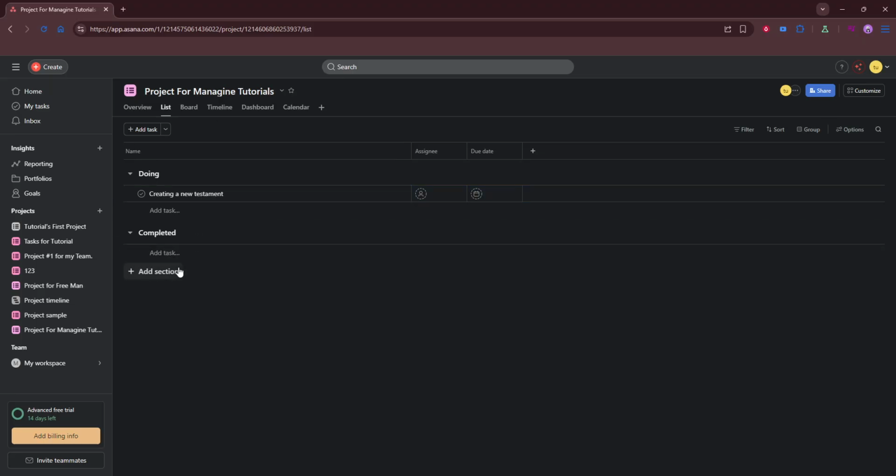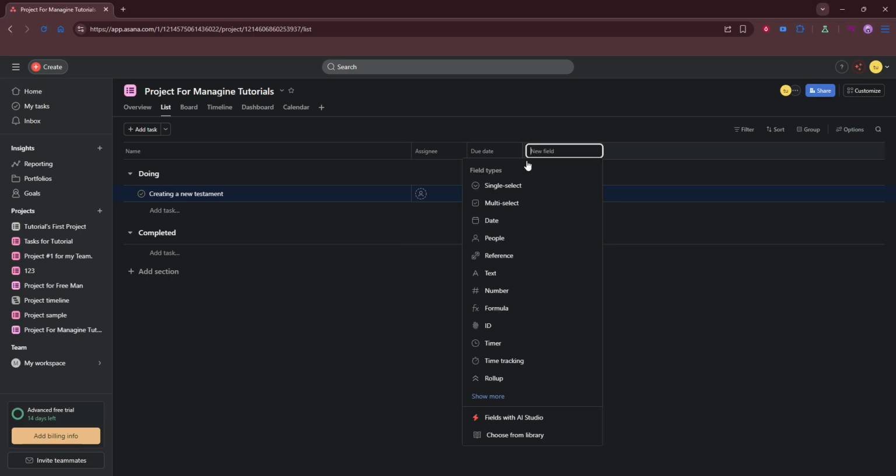Assign tasks to team members and add due dates. One clear owner per task avoids confusion, even if others collaborate. Choose realistic deadlines based on effort, availability, and dependencies, and add them directly to the task so timelines are visible in all views. If a task depends on another, note that in the description or link the two so handoffs